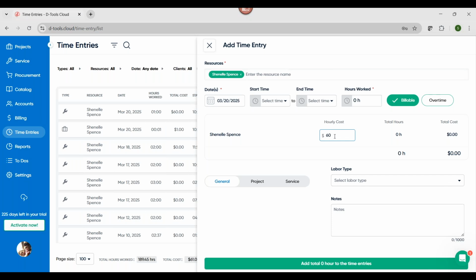It's because your resource isn't assigned an hourly cost. But you can do cost as well as burden. So burden allows you to capture additional costs for that employee, maybe insurance, healthcare, things that benefits that you provide as an organization that impact the cost of that employee.